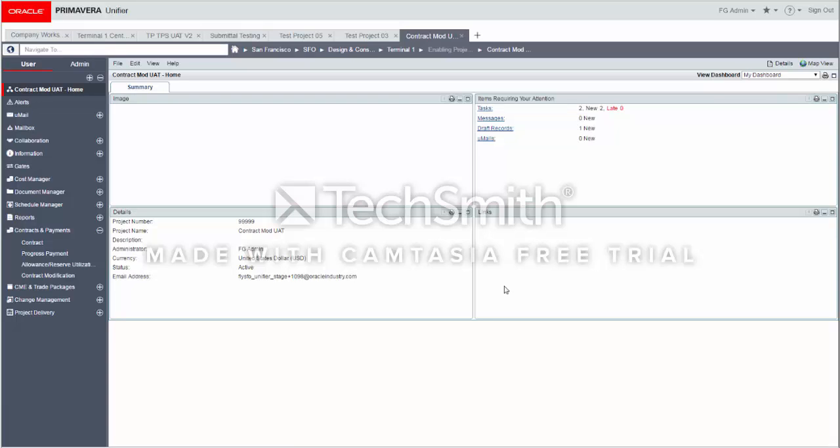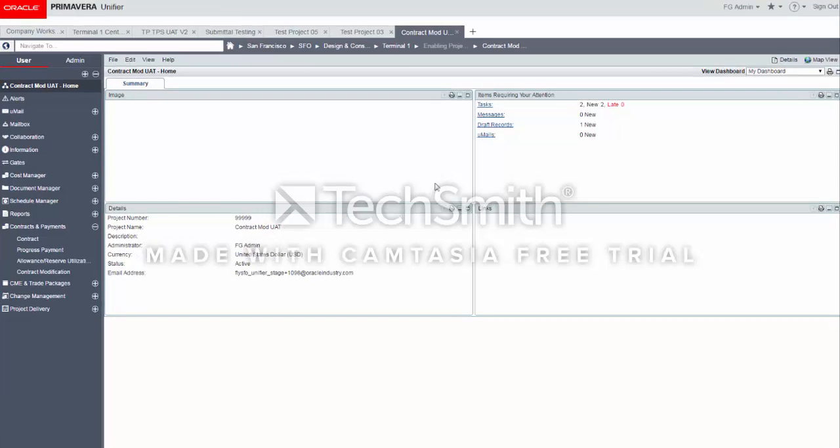Contract modification business process is a process that enables the project team to modify the existing values within a certified contract. Contract modification enables the project team to modify the contract's authorized base contract cost, the contract's authorized direct construction costs, the contract's authorized Type 1 contingency, and the contract duration beyond the initial 10% flex.